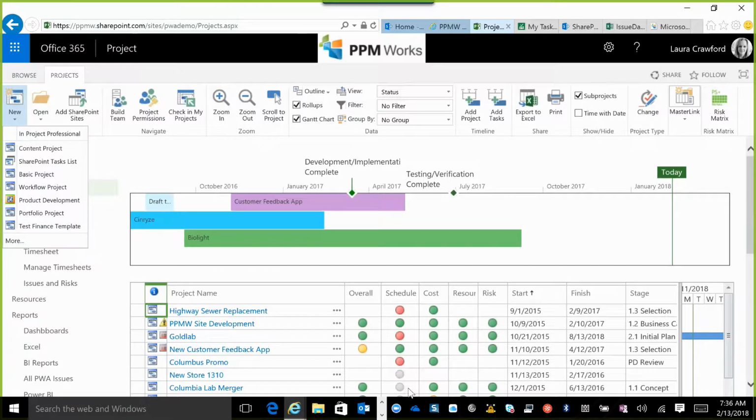All right. Anytime you see these white ones, we usually put those in there. You might be wondering what those mean. That indicates that the project hasn't been baselined from the schedule aspect, so we need to make sure that we baseline that project. Some of these may be manual indicators, and some of them may be formula driven. So you can have both in there. If you are baselining your projects, then you can take advantage of the formula driven indicators, which of course, every time you're updating your project and publishing those, these indicators get refreshed based upon how your project is doing.